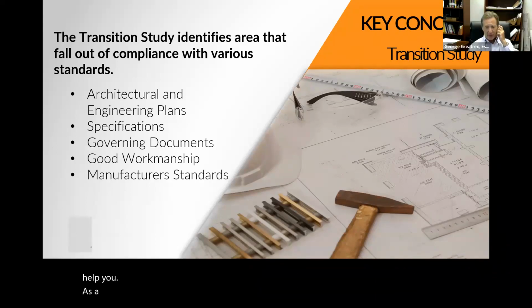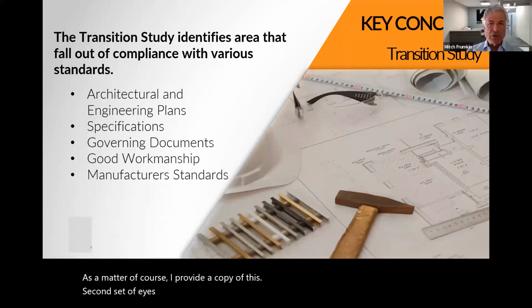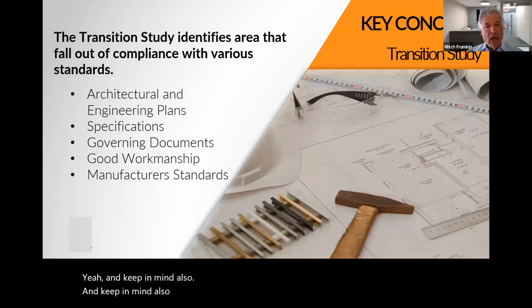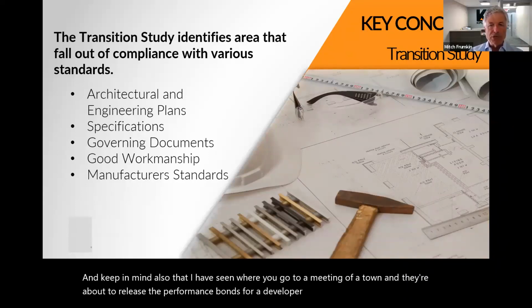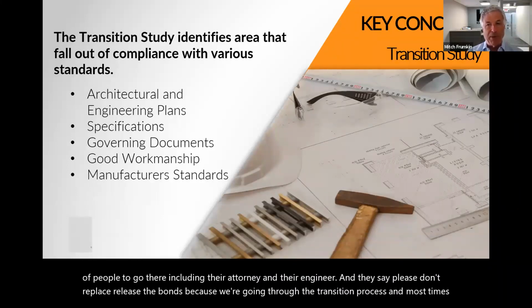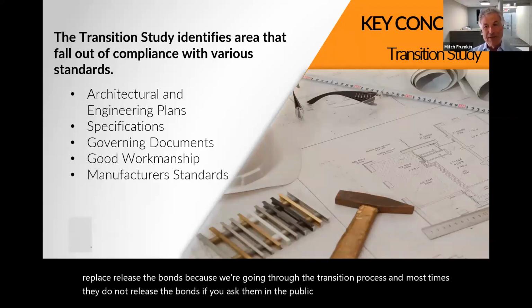As a matter of course, I provide a copy of the association's engineer's report to the township so that can be a second set of eyes to hopefully benefit the township engineer when they're looking at bonds. Yeah, that's great. I didn't realize that you actually did that. That's very good. Yeah. And keep in mind also that I have seen where you go to a meeting of a town and they're about to release the performance bonds for a developer, where the association gets a group of people to go there, including their attorney and their engineer, and they say, please don't release the bonds yet because we're going through the transition process. And most times they do not release the bonds if you ask them in a public setting like that.